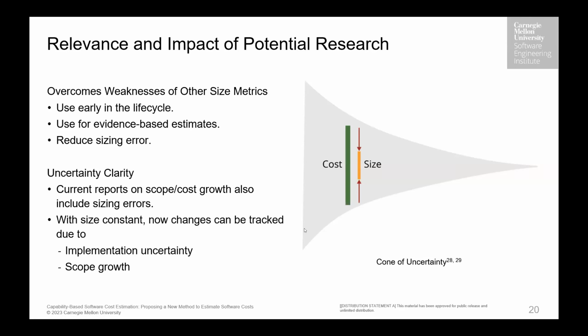Okay, I might not be fully understanding your question, but the thought process would be that the capabilities that we define and the groups for software, this would be a way to break up our software into smaller pieces and then to also formulate a baseline that we can track progress and metrics and change the estimates as we go along in time. So the idea would be you first have your effort range, and that would come from actual data so that we have something that's evidence and data based. But then as you move along and you use your size metrics or your other estimating methods, you could use them as is, or